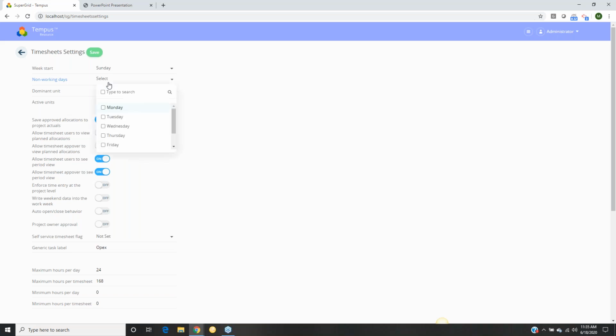So it is very important to set this up before you create your time periods, since those don't retroactively update based on what you provide. So if you are new to timesheets, you will want to set this up first. If you're not and you want to update them, you can do it for your ongoing periods, or you can recreate the periods you've already created.